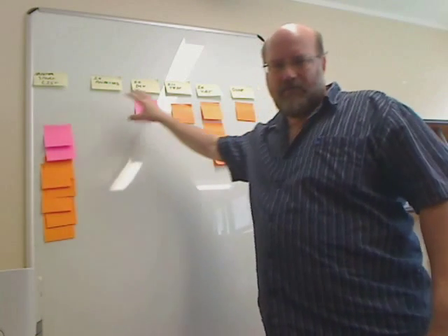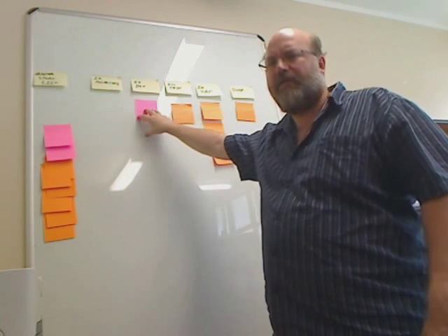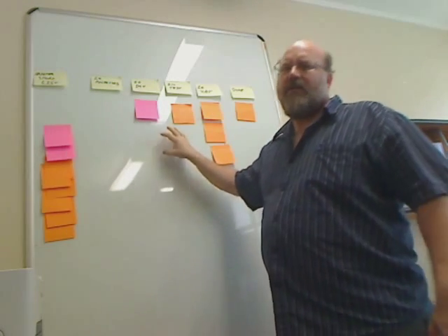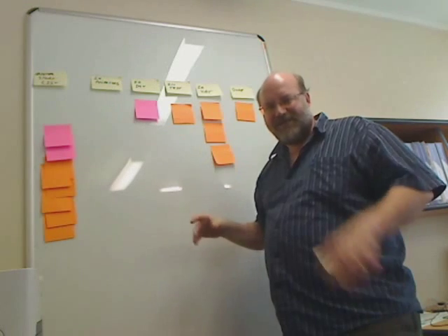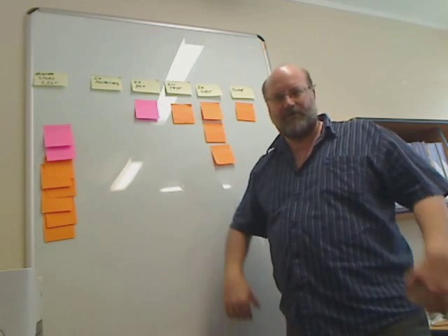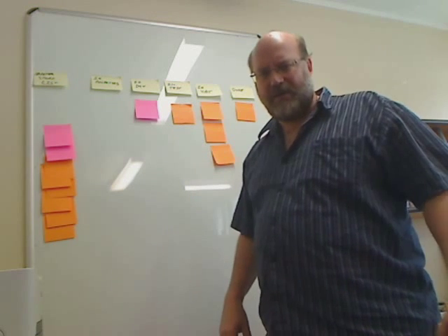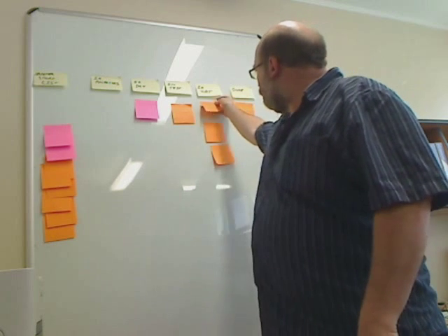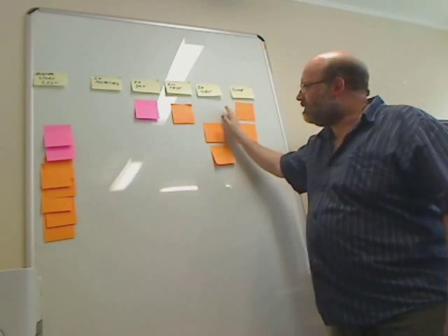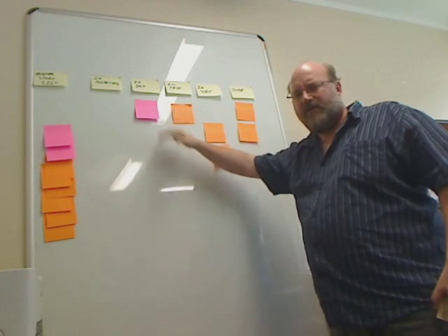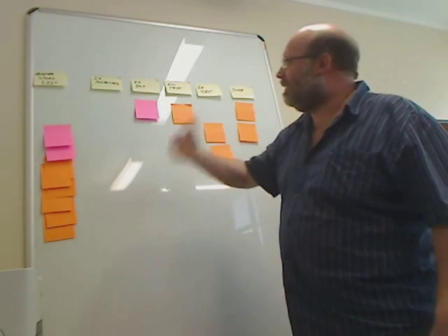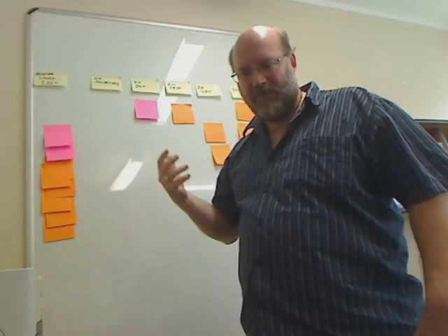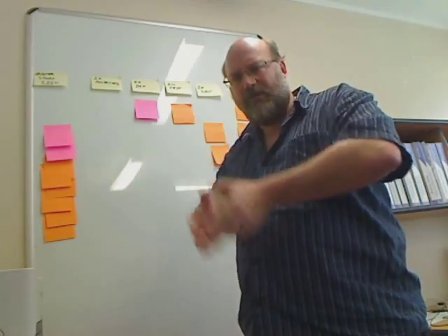This way we keep track of defects that are coming up, but we do find that the in-dev, in-test movement significantly reduces the level of defects that escape from an iteration. And it's one of the key areas where we see significant quality improvements from Agile projects. We cannot claim that a story is done unless all of the test cases have passed. So again, that active involvement of developers, testers, analysts, designers, working together to deliver business value rather than focusing on their siloed